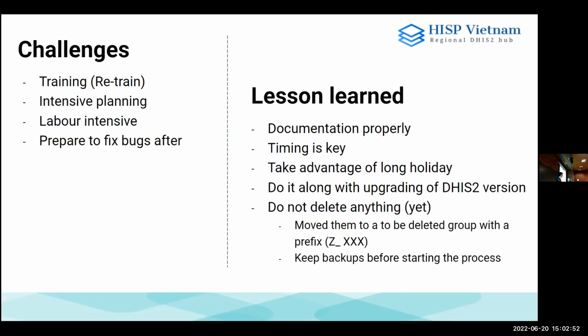Then the timing is also important, because most of the time we need to make sure that after we clean up, we don't need to use the data to make a big report. So make sure that you plan that, because there will be some bugs and you will not know. After you did the upgrade, make sure you have some time for testing to fix that. Also take advantage of the long holiday. I'm not sure about other countries, but in Laos we usually have Lao New Year, which is quite long. So we took that opportunity to upgrade the server and also to do the cleanup.